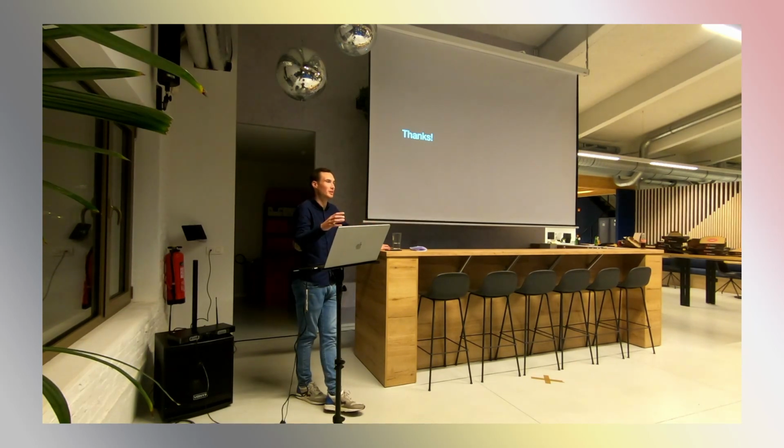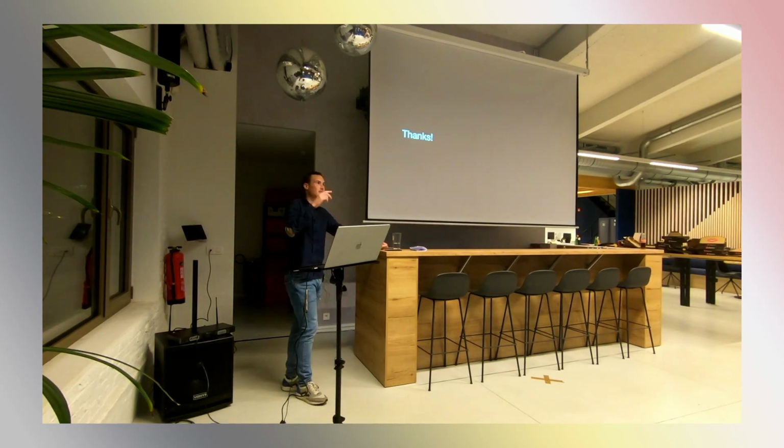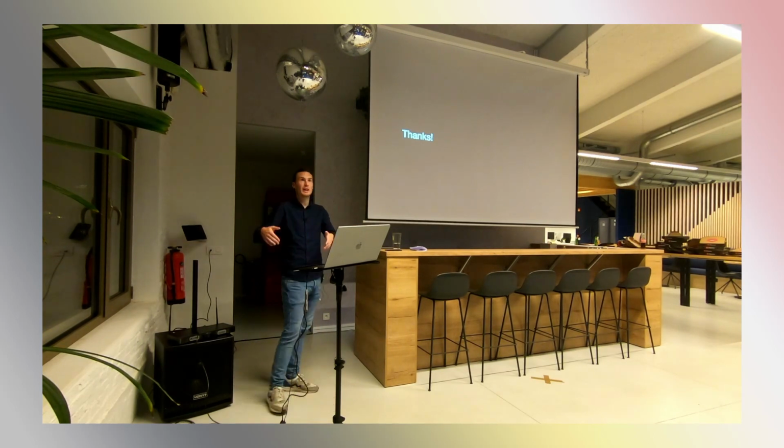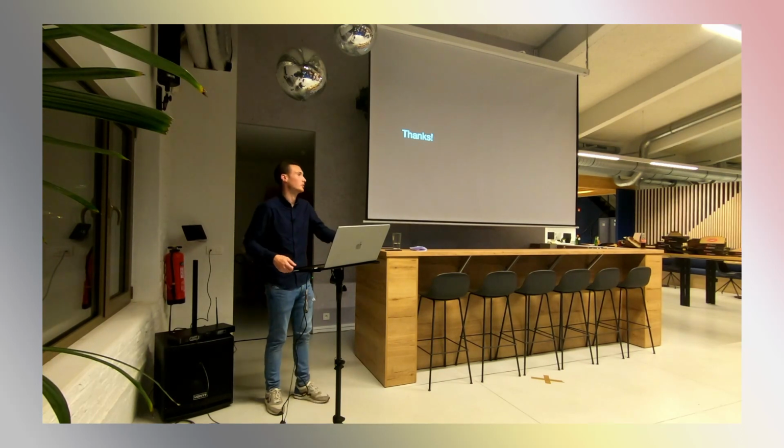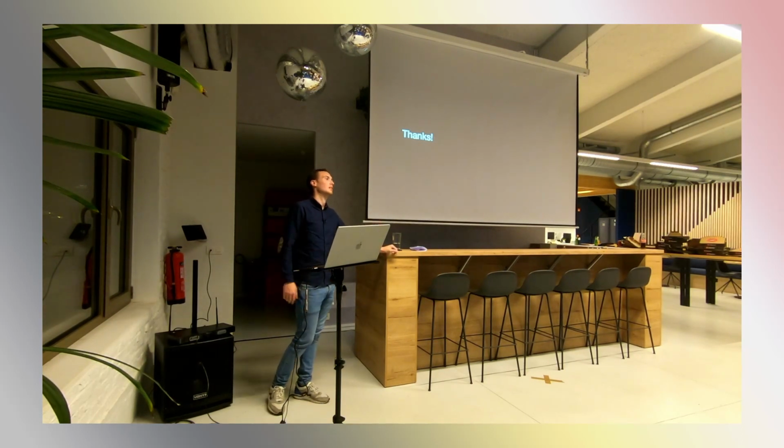We know the velocity, for example at icapps we have a velocity of 4.8 story points a day. So if a story, like a login, our base is 5 story points, I know it will take around 1.1 day to solve it. So I can go back to my client and say, we have like 80 story points left, our velocity is this, we will end up next week at that exact moment, and we can deliver you those features. So that's why it's very important for us to have the...